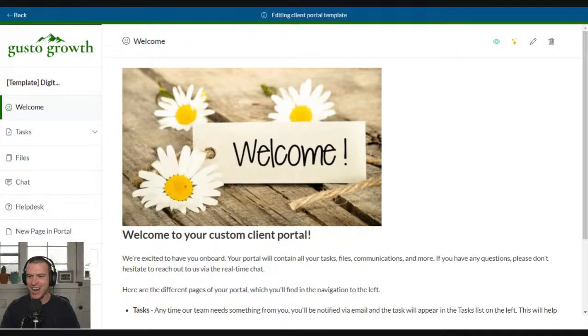And I see that Scott actually had the exact same question, that it is something you can set up at the template level. And for an additional note about that, I would say that these automations are actually the most useful at the template level, because if, for example, something is happening in a third-party tool or an external tool that you're using, you can, number one, create a project. For example, when a form is filled out, automatically create a project and add the client, have that project created from your template, and also include all of the automations that you set up at the template level.